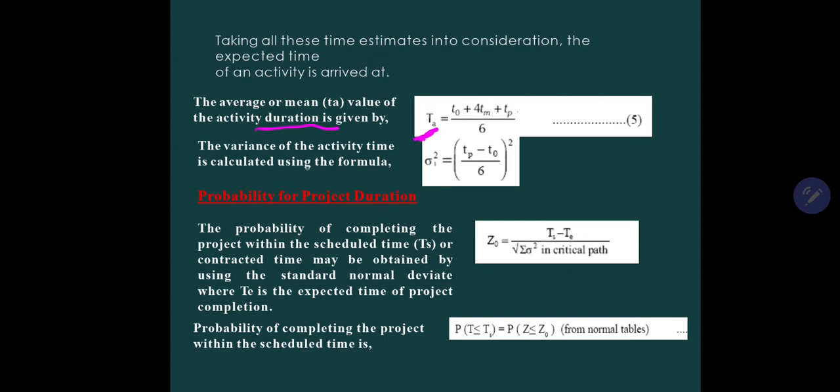The variance of an activity is given by the formula sigma square. Here the square is not down here, most students do this mistake. Sigma square is (TP minus T0) divided by 6, whole square. It is not sigma, it is sigma square. So for calculation of sigma, you have to take under root of ((TP minus T0) divided by 6) whole square. It is not the square of (TP minus T0), it is (TP minus T0) divided by 6 to the whole square.